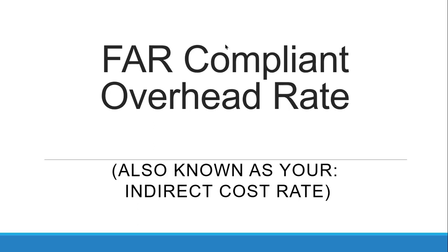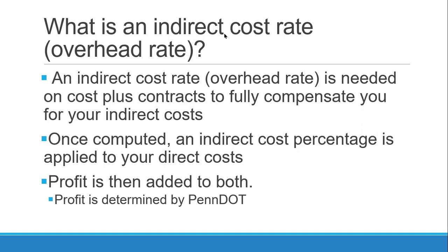Welcome to the video on how to develop a FAR-compliant overhead rate. An overhead rate is also known as the indirect cost rate. Once computed, an indirect cost percentage is then applied to your direct costs.